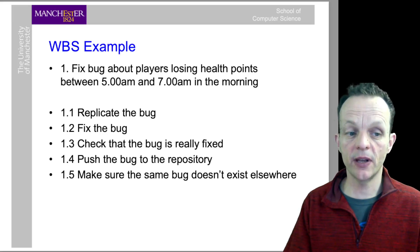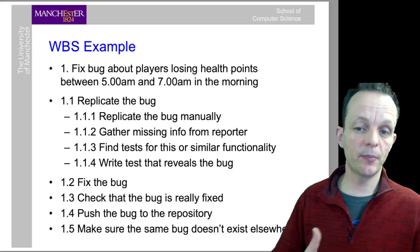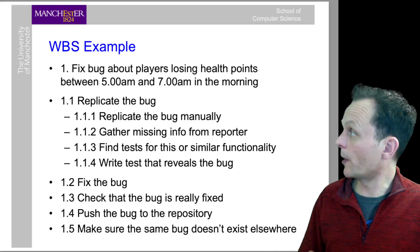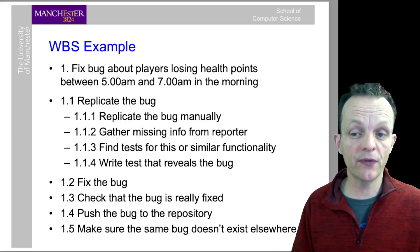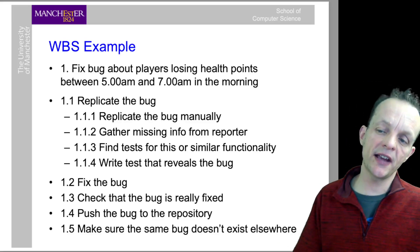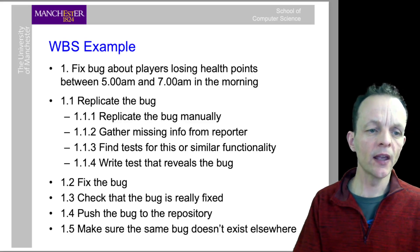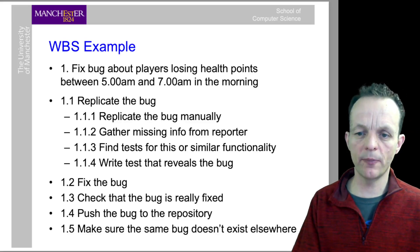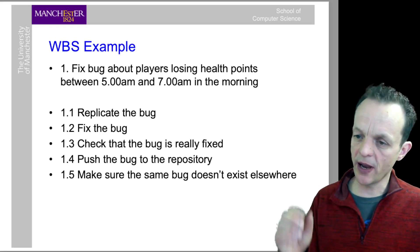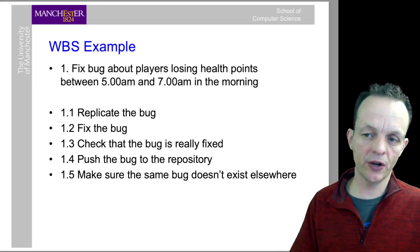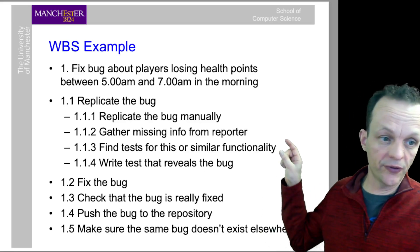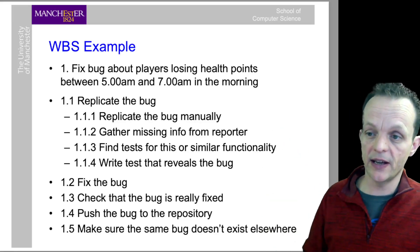We can break each of those steps down even further. For example, replicating the bug - we might replicate it manually, gather missing information from the bug reporter, find tests for similar functionality, and write tests that reveal the bug. The hundred percent rule means if you split evenly with five points, you might have 20% on each, and your total needs to add up to 100%. Within that 20% for replicating the bug, we might break it down further into even smaller percentages.